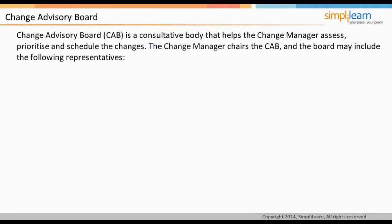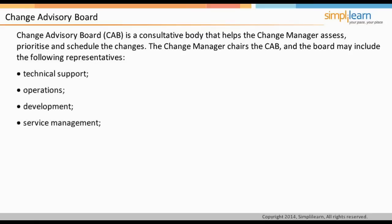The Change Advisory Board (CAB) is a consultative body that regularly meets to help the change manager assess, prioritize, and schedule changes. The CAB is a group of experts with a clear understanding across the whole range of stakeholder needs. The Change Manager chairs the CAB, and the board may include representatives from all areas within the IT service provider such as technical support, operations, development, service management, customers, other stakeholders, and third parties such as suppliers. In short, people who are directly or indirectly affected by changes should be part of the CAB.